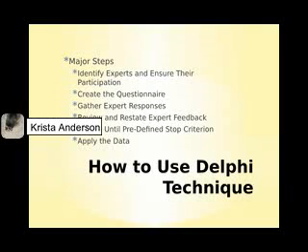The first step in applying Delphi Technique includes identifying experts and ensuring their participation. The experts do not have to possess experience doing the work or dealing with the risks under consideration, but they should be people who are familiar with the organization, the customer, and their mutual concerns.